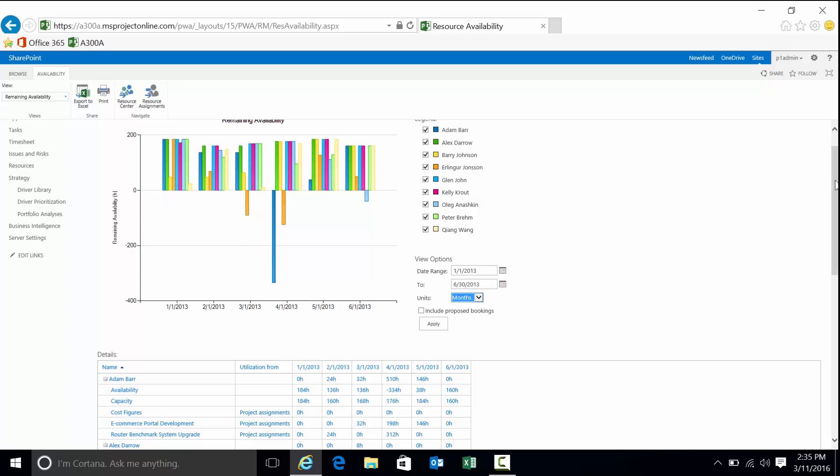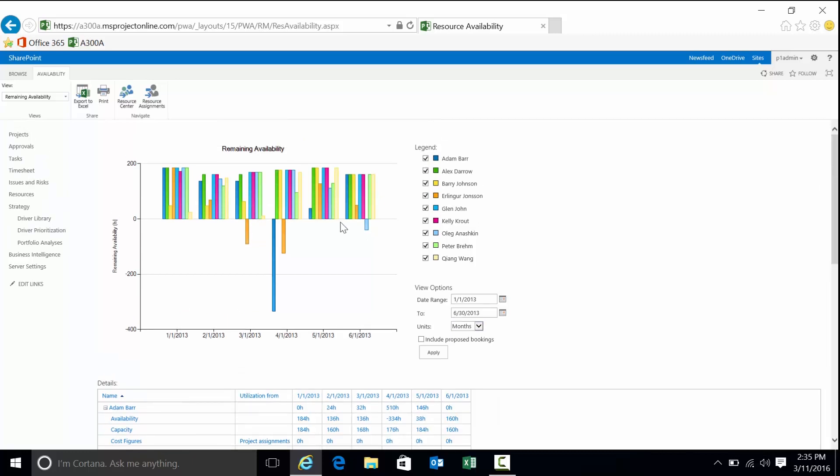If we look at this, bars above the zero plane represent availability. Your full-time FTEs, for the most part, are going to be able to work anywhere between 160 to 184 hours in a month. Bars at the zero plane represent 100% utilization. Bars below represent over-allocations. Therefore, if I happen to be a PM staffing a project, it's a fairly good bet that Adam in this particular case, we can look at Alex for this time period, looks like Glenn and John have plenty of availability as well.